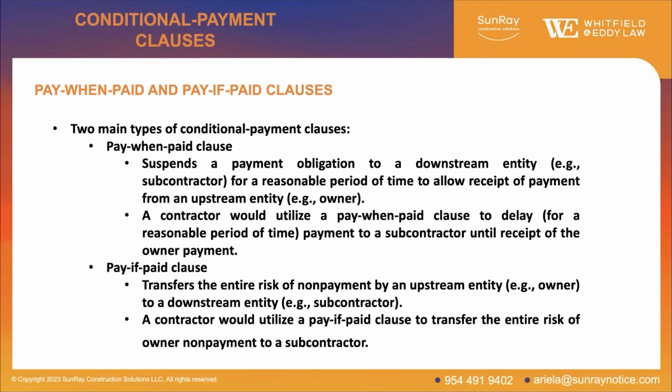So a contractor would use this pay when paid clause in their subcontract to simply delay payment for a reasonable period of time until they've received payment from the owner. I contrast that with a pay if paid clause, which transfers the entire risk of non-payment to a subcontractor. And so a contractor would utilize that clause to transfer to a subcontractor the entire risk of an owner's non-payment. So those are the two main clauses you see. If we go to the next slide.